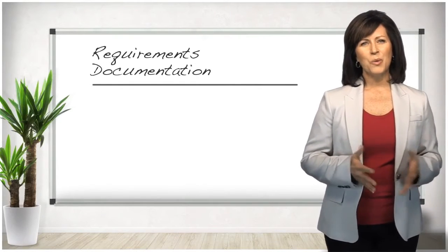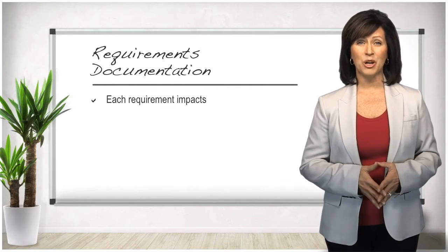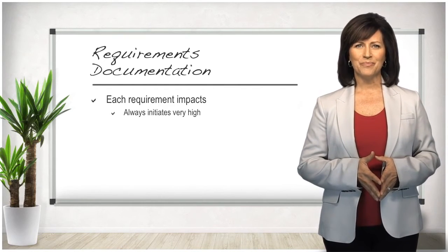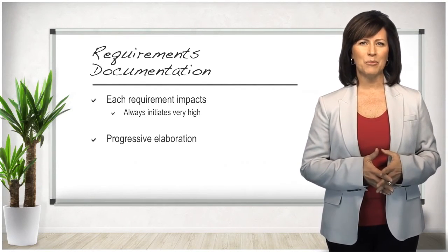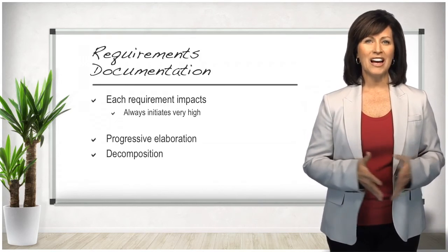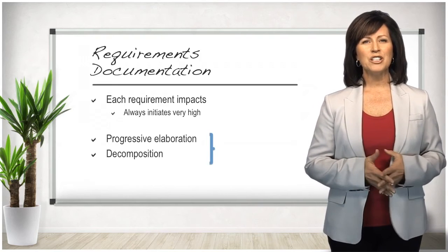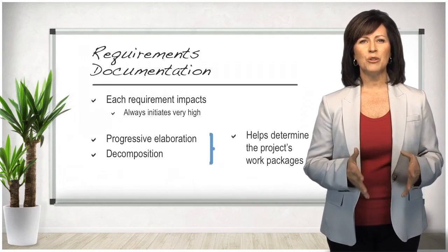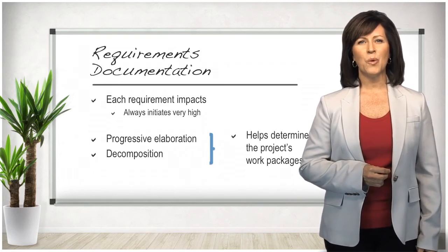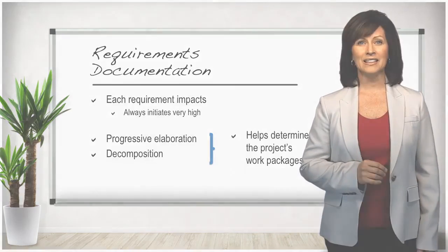To start with, requirements documentation describes how each requirement impacts the project. Requirements always initiate at a very high level. They contribute to progressive elaboration and decomposition activities, which break down the high-level requirement and make it more specific. Progressive elaboration and decomposition help determine the project's work packages. And in order to baseline requirements, they need to pass the criteria for measurement and testing.